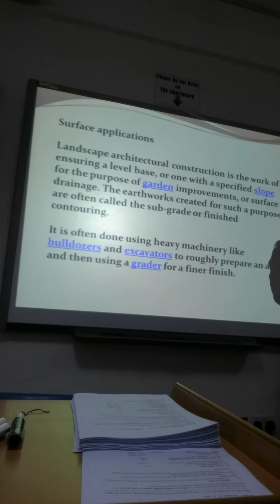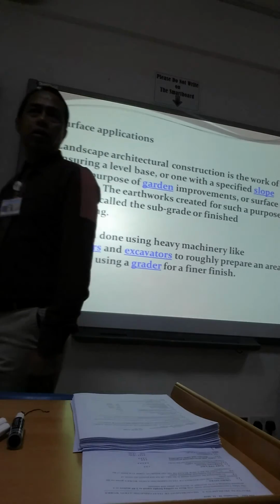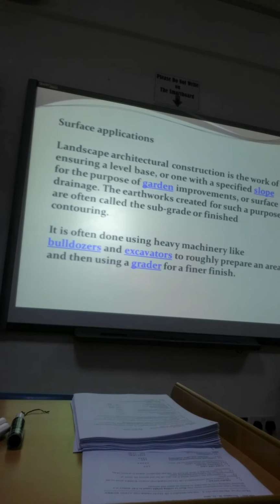Then it is often done using heavy machinery. Then you need to have bulldozers and excavators, and then using a grader. Then the equipment quantification of the time, the period and the duration that this heavy equipment will be utilized in your project. No one can prepare this quantification except you as a quantity surveyor.